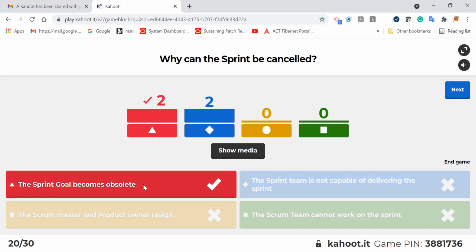But once the sprint goal becomes obsolete, maybe due to various reasons, for example the technology may not be handling things the way the customer expected, or the customer does not want to consider the requirements anymore, then the responsibility or authority comes from the product owner. The decision is taken by the product owner whenever the goal is obsolete, or not required, or not really meeting the need, or is a little old. Only then can the sprint be cancelled. And this is a very rare case.